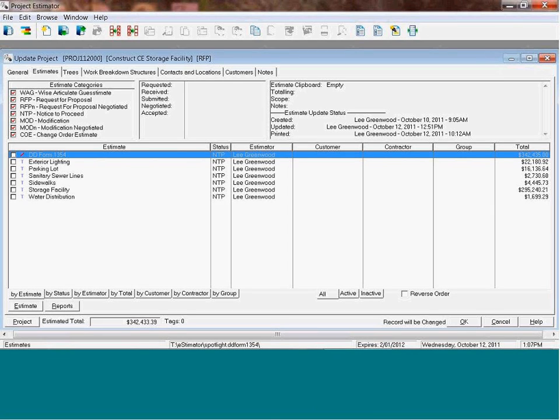A new way that we've been working on lately is to give you the ability to go to those estimates, grab the key line item in that estimate that best describes the type of work that's being done, paste them into your estimates as custom, and go ahead and tweak the unit of measure as well as the quantity based on what you're going to need to do with your 1354.